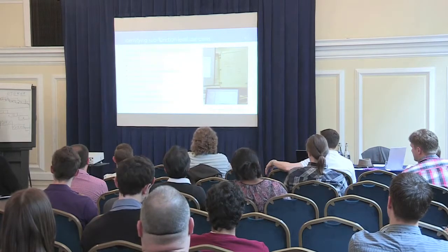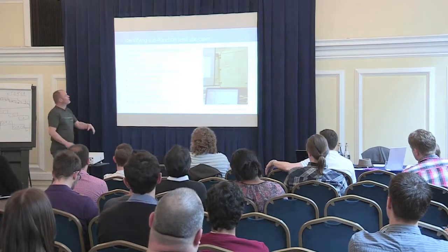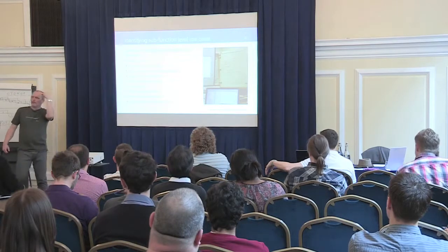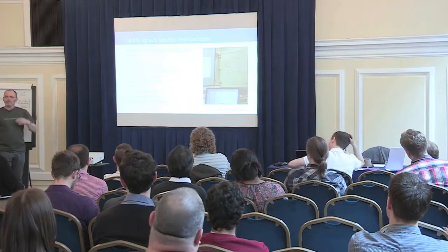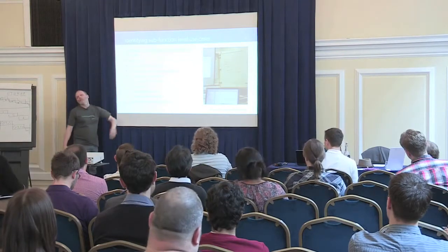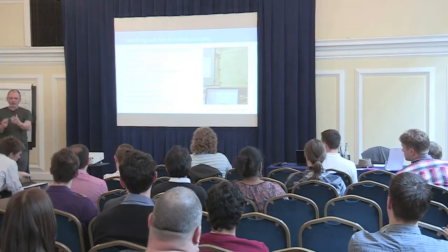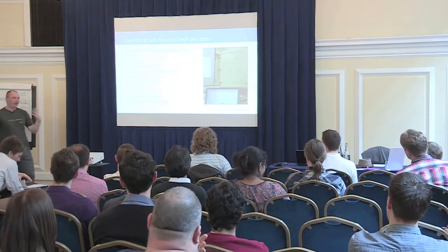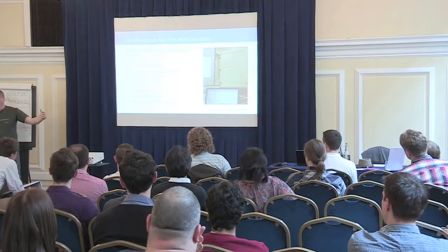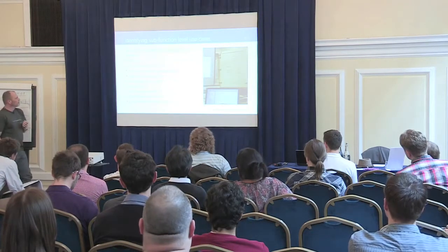So these are basically our guidelines for getting these use cases out from the bigger use case. And they go at any level, right? If you see a piece of functionality inside of your use case that you might want to reuse, you can just pull it out, right? Or we also say, do not model more than one form per use case. So every form you have in the interaction of this big use case, just pull it out as a separate use case. And the same goes for things like web parts and calculations and interaction with other systems, et cetera, et cetera. So this is a bunch of guidelines that you can actually use to pull those things out.